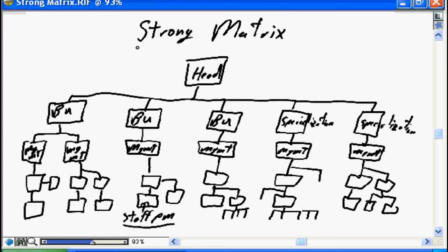The next form of project delivery organization we're going to discuss is the strong matrix. And the strong matrix starts with the functional organization just as the weak matrix did. The key difference between a strong matrix and the weak matrix that we just discussed is instead of having the project management responsibilities assigned to one of the existing line managers, in a strong matrix relationship, traditionally within the business unit, there is an assigned project manager.